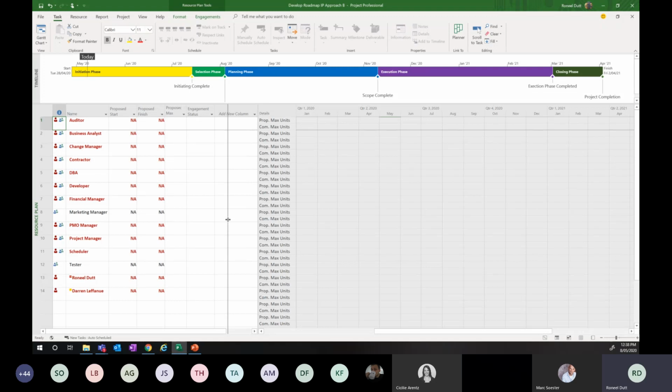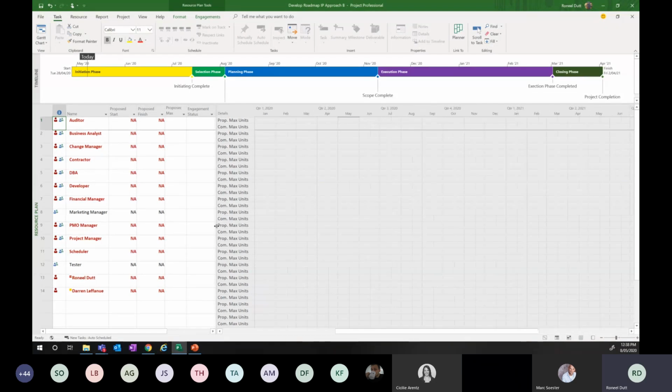The resource plan view is meant for you to do a high-level plan of how you're going to commit the resource and what your intentions are. It then gives you visibility of the availability of the resource for these respective tasks, and now I can pick these resources and plug them into the relevant tasks that I planned them for.